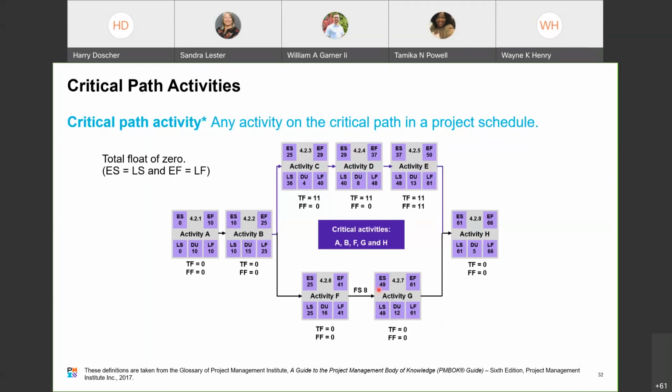Okay, so if you take a look here, your early finish is the 61st day here. Your early finish would be the 50th day here. That's the other way of taking a look at it. This early finish takes into account the duration of this activity plus any of the time taken between the two, plus the early finish of any preceding activities.